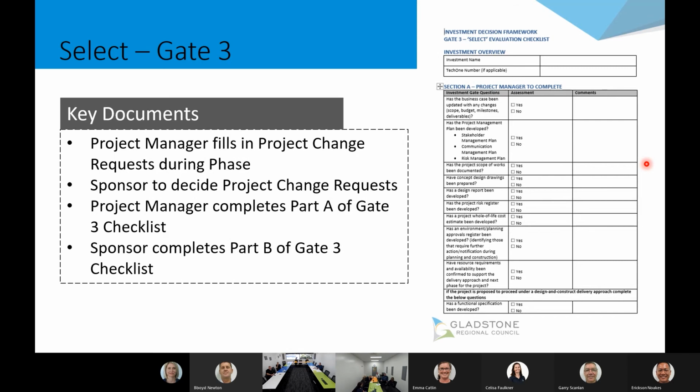No. Because then by the time it becomes a project, the project's actually clear and it can be acted on. So rather than still have options after you've already assigned a project manager. What's he actually managing? He's still managing options. He's not actually managing a project. So yes. Should that not be part of gate 2, option selected, gate 3 start?